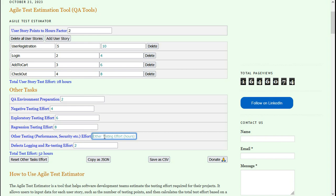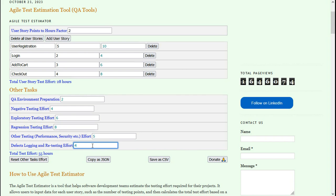Defect logging and retesting is going to take 4 hours, based on how many defects I expect and how many times I have to retest those defects after they are fixed.